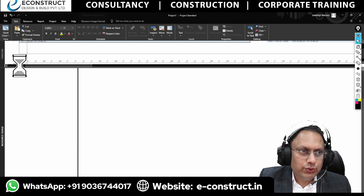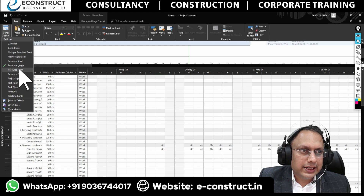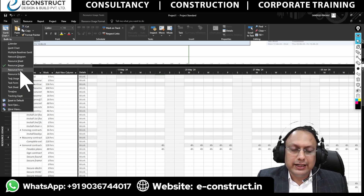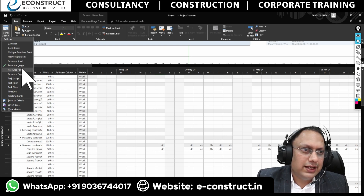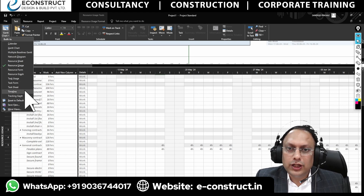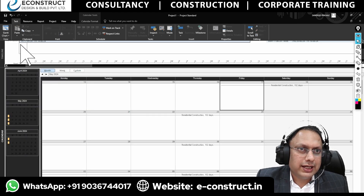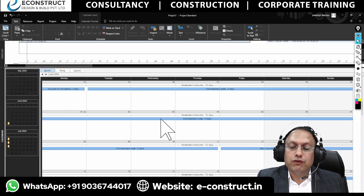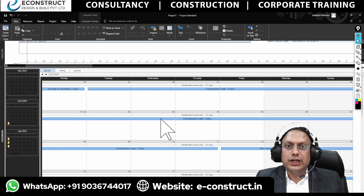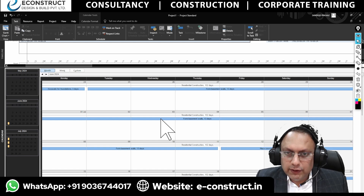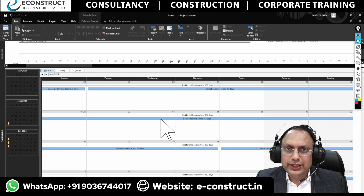Similarly, you will have the resource sheet and resource usage view — showing how many people are being used in a particular area. If a lot of people are being used in one area, you know you require resource leveling. These are the areas where you get all this information. Project management software like MSP and Primavera will help you see the project in a completely different domain.